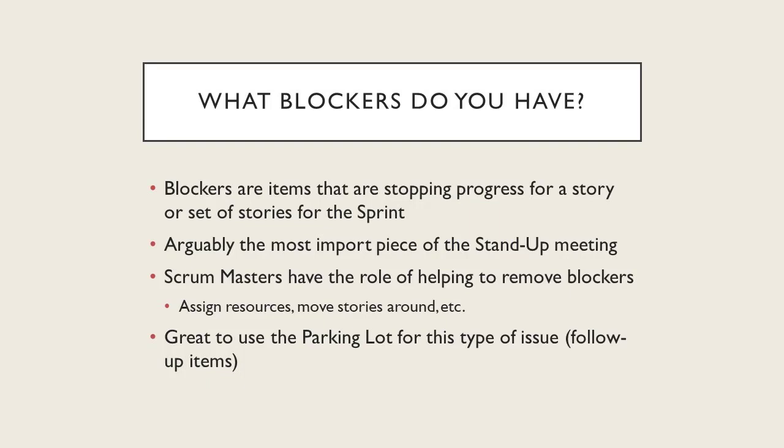And one of the reasons why this is the biggest piece of the daily stand-up is as a Scrum Master or Project Manager, one of your main goals is to help remove blockers. And so in this instance, maybe a developer is working on a story and they are stuck on how to architect the code to be able to actually have it function properly and keep running into errors. And so this would be considered a blocker. And what would happen is they would say, yesterday I worked on this, but I had a blocker and I was unable to complete the story yesterday. Maybe the story was estimated at 4 hours and they spent 8.